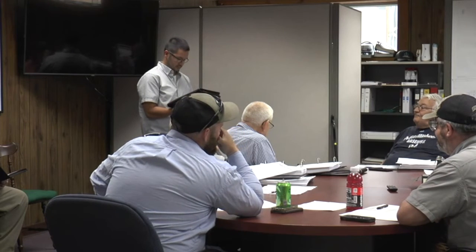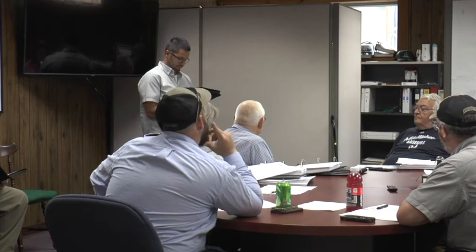At the same time, we're working on our 30% cost estimate, so I'm getting updated numbers from all the manufacturers, the suppliers, getting lead times. Electrical equipment has extremely long lead times, so that'll kind of have to be worked into the bid. And then sensing stuff, we're hoping that keeps on moving forward as well.